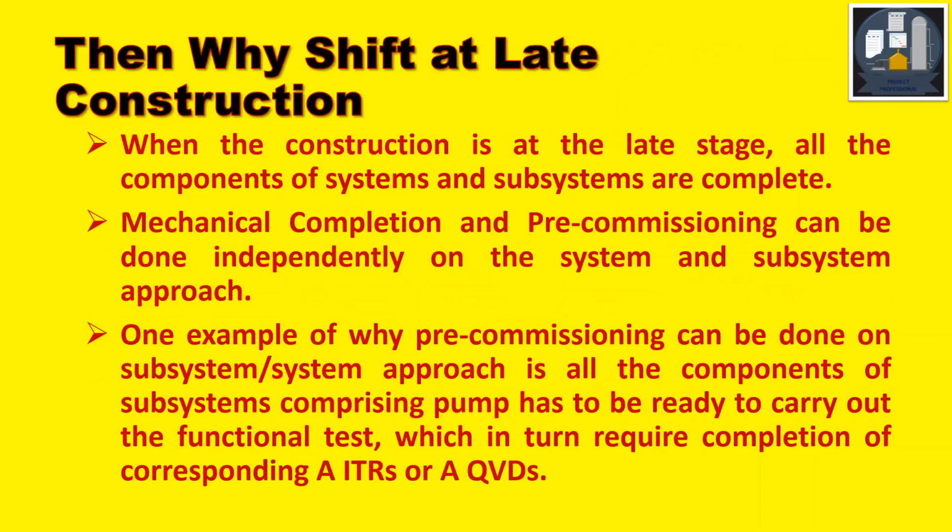Then why shift to the systemized approach at late construction? I will explain why. When the construction is at late stage, all the components of system and subsystems are complete. A system or subsystem may comprise a pump, piping, instrument, and all those things. So as we approach late construction, all this gets completed. This is one thing.